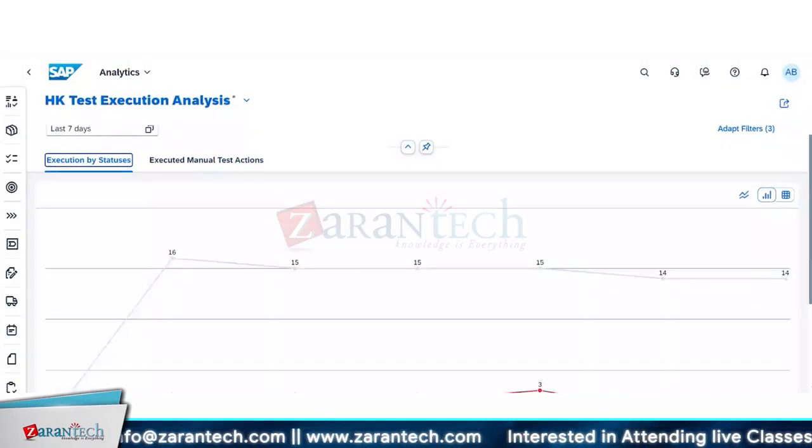Across all the test cases, obviously, right? And it will count a test case. As I've told you, the same test case can be used as part of different test plans. You can assign the same test case to different plans, and that becomes a separate instance of that test case, right? So when it is counting, let's suppose you have a test case ABC that is part of three test plans, and you have it individually also, since some test cases are not part of any test plan. It is going to count four items when calculating the total steps: one for the test case itself, then the three test plans. So two, three, four.